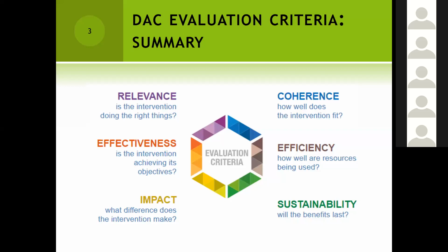That basically means that now we don't just look at relevance, which basically means whether the intervention is right, something you always want to check when evaluating. And also effectiveness, that is, is your intervention achieving its objectives? Also impact, where you look at what difference your intervention will make.